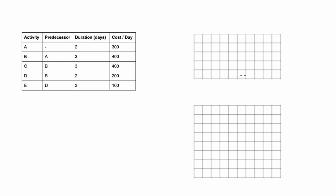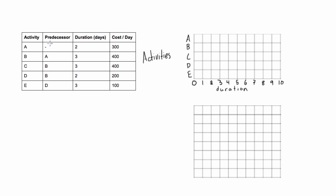In this video we're learning how to draw project S curves for cumulative costs of a project. First we'll need a Gantt chart, so let's set up the axes and fill in the bars. Activity A has no predecessor and it's two days long, so it starts at the beginning — from zero right up to the end of the second day.